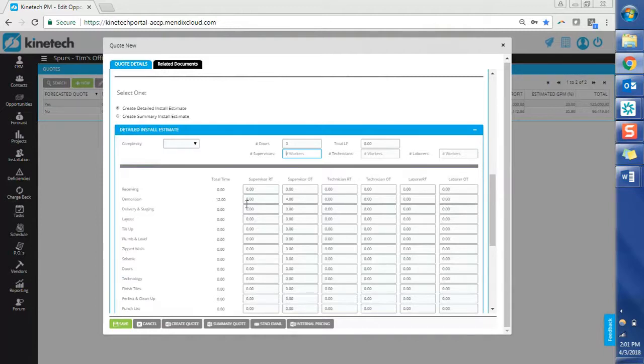So if we were assuming this demolition was all going to happen in one day, be it a long day, and then once the status report comes in and we really have 16 or 18 hours because it ended up taking a day and a half, well, it's like, okay, maybe we need to be more conservative on our estimate for that, or maybe we need to build in some contingency, and it's specifically related to this.